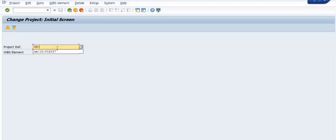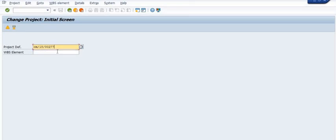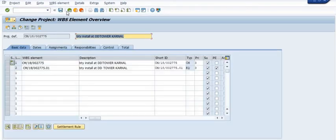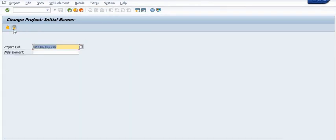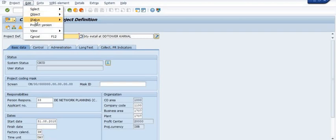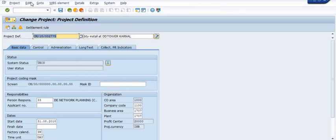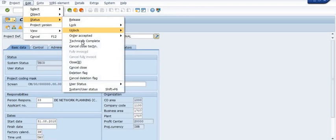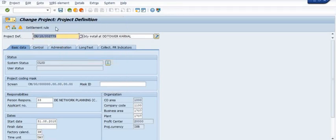For example, we have a purchase WBS and that is the project. We want to close this WBS using the direct project definition method — we will use 'Technically Complete' and then 'Close' via transaction CZ02.